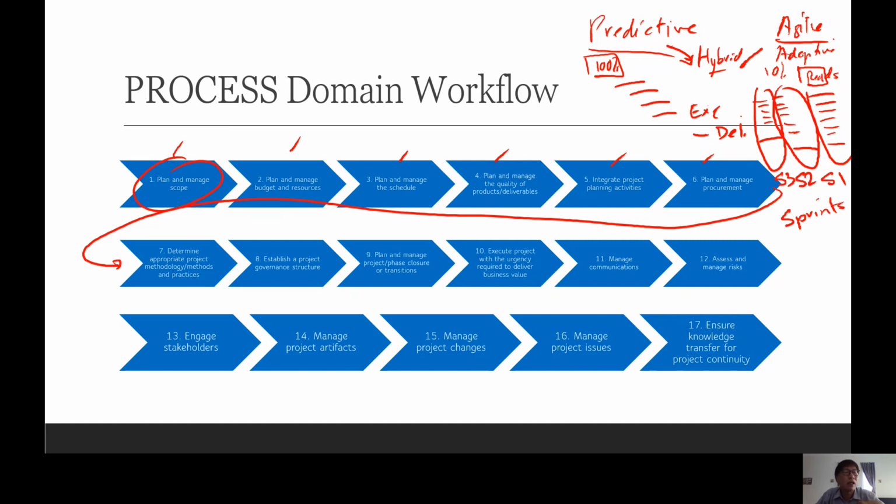Makes sense, right? But what if the cabinet carpenter says he cannot deliver today? You do other things first, like the wallpapering and the carpeting. So obviously we get the wallpapering guy to come in. And when the cabinet carpenter is ready, he will put in the cabinet and close up the wallpaper behind it. So there will be wastage on the wallpaper there. Well, that's the wastage. What do you do? But still it's agile. We're accommodating, right?